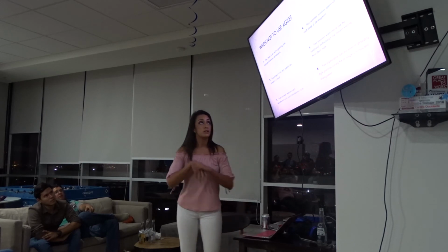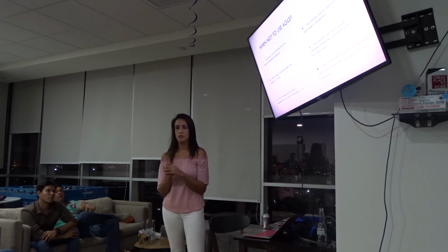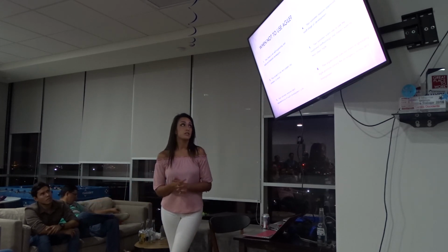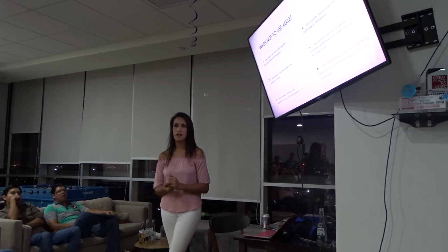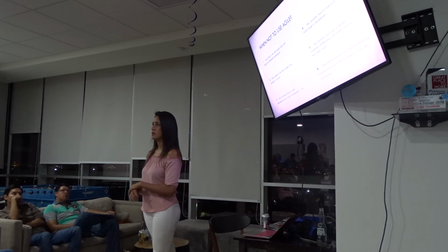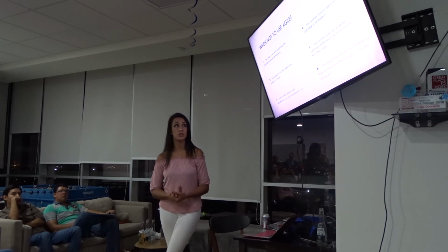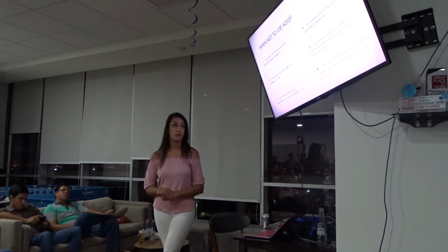Okay, so when not to use agile. If your team is not a self-organized team, or if you have to be telling them what to do, it's not going to work. If your project is very urgent or too complex, it's not going to work either. If your customer requires neat documentation in each development cycle, because in agile we kind of skip documentation, agile won't be the best to use. And sometimes there are projects where you need approval from each stage. That's going to take forever and not really work.